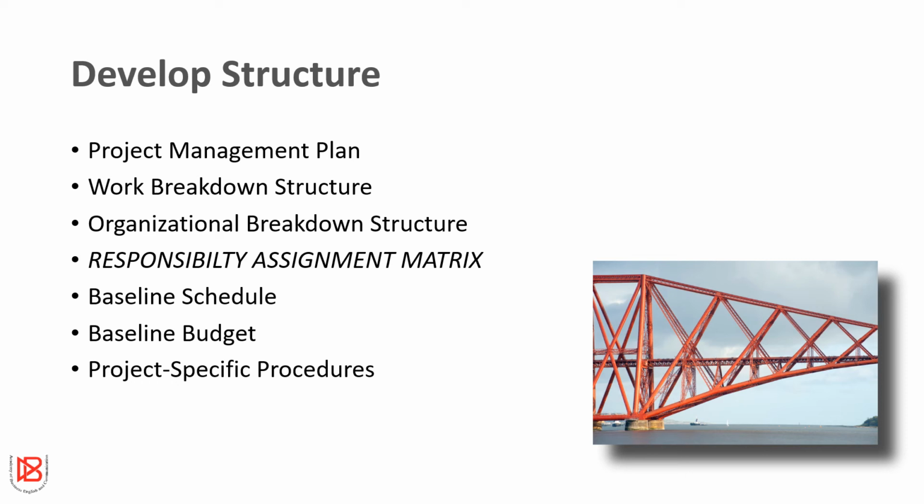When I say work breakdown structure, everything will be broken down. The work will be broken down into jobs. The job will be broken down into each task that we are looking into. The tasks will further be broken down into activities. So one is the PMP, the project management plan. The other one is the WBS, or work breakdown structure.